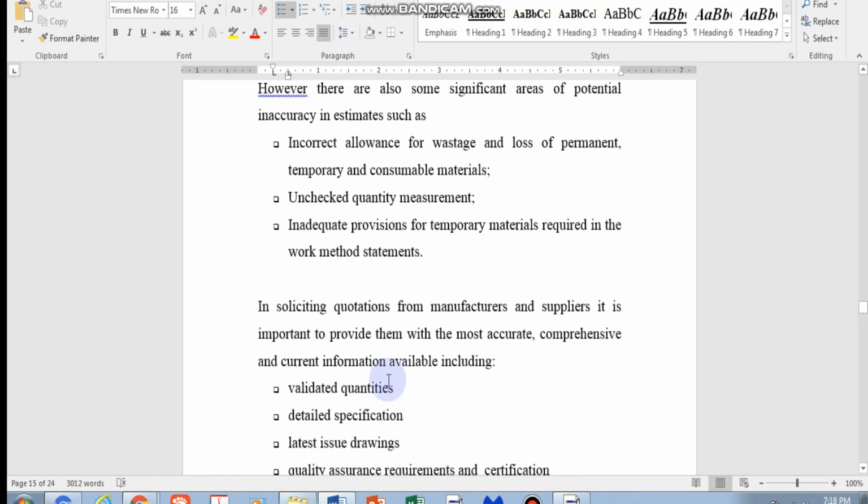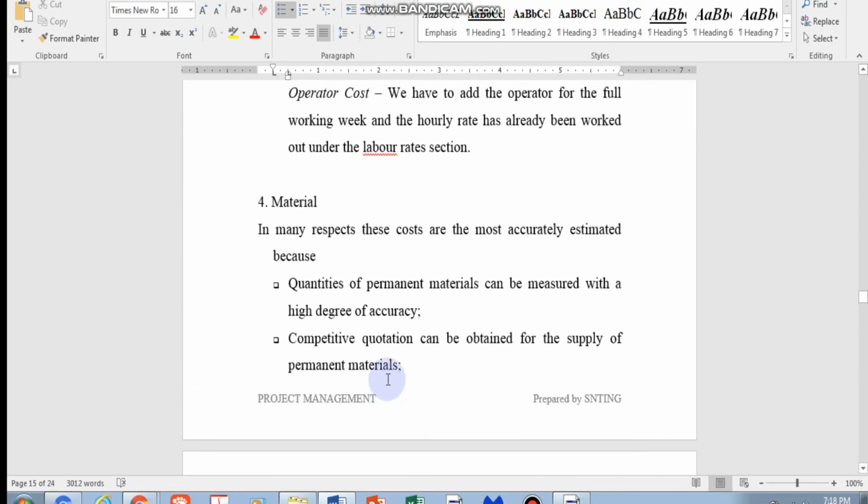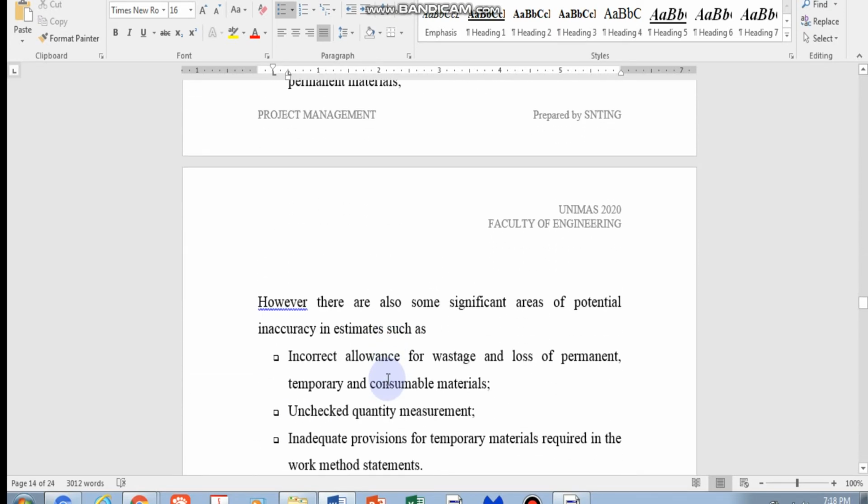Okay, so here these are things dealing with material, and in terms of procurement we need to be very careful. We also need to look at the billing cycle, meaning that if the supplier can give you 30 days, 60 days, 90 days or 120 days of payment, you will manage your cash very differently. So we'll talk about that more in cost management later. This is more on what we call cost management, financial management dealing with cash flow and all that. Yes, it's also part of the engineering, what an engineer must learn to do as well.